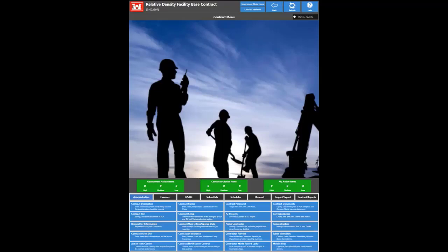Completing a weather modification is done in two parts. The first part is creating a change request. A change request is generated in anticipation of a potential or real modification to the contract. The process generates what is known as a basic change document, or BCD. The BCD describes the change, the reason it is necessary, the initial estimated cost, and the time impact.